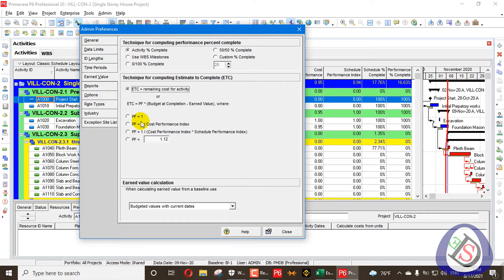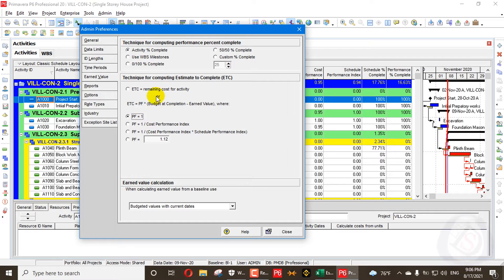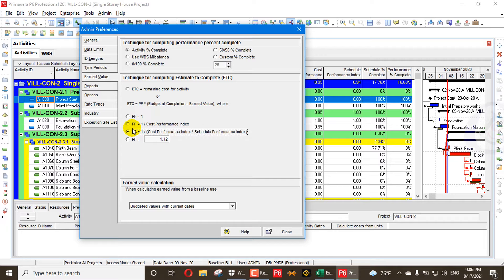The Performance Factor sub-options are: PF equal to 1 — if you use 1, the result is the same as the remaining cost option. PF equal to 1 divided by the Cost Performance Index (CPI). PF equal to 1 divided by CPI multiplied by Schedule Performance Index (SPI). And finally, you can enter a Custom Performance Factor manually.